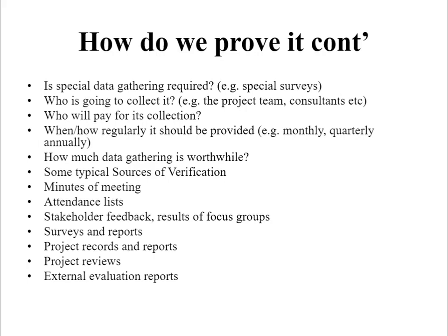Is special data gathering required? Who is going to collect it? Who will pay for its collection? When or how regularly should it be provided? Is it monthly, quarterly, or annually? How much data gathering is worthwhile? Some typical sources of verification: the minutes of meetings, attendance lists, surveys, reports, project records, as well as reports.